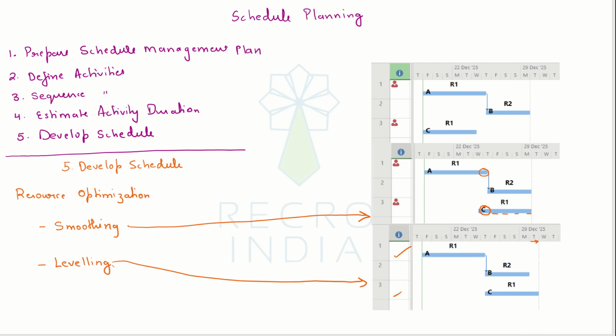So the main message we can take from this is, we can go to our stakeholders and present them the smoothened schedule, where we have tried our best to adjust the start and end, and even after that we still have some over allocations left.